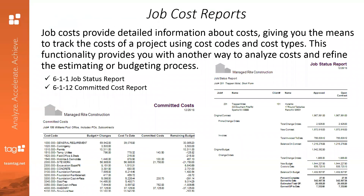Sage 100 Contractor breaks down job costs through cost codes and cost types. You have the capability to use a custom cost code structure or one of the pre-built standard industry cost codes. This detail in reporting allows you to refine your estimating or budgeting process. If you're using the estimating module within Sage 100 Contractor or Sage Timberline estimating, you can export that estimate right into the project budget, and estimating basic lets you export all your purchase orders and subcontracts with just a couple of clicks.